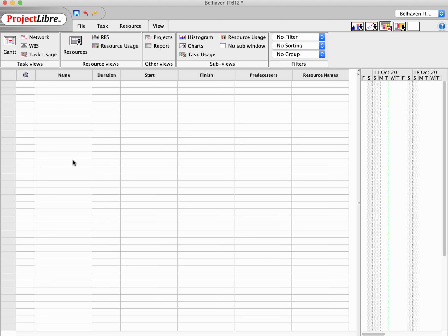And then the last one, resource names. As you add resources, people or equipment or something that you add in. And a good example, let's say that you have a group of people working in a remote location, and you have to feed them lunch every day, and you deliver lunch to the site. Now that may be something, because of the cost, that needs to be tracked, and that would be a resource. So you could say, we've got 5 resources, they're going to be remote, we're going to have to deliver lunch to them, and that's going to cost us $500 a day, and we want to track that. Sounds like a pretty good lunch to me, huh? And so anyway, that's where you'll see the resources stacked up as you start to add them.